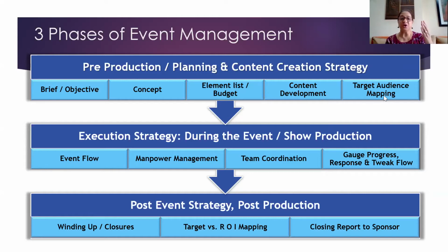Obviously, there has to be good team coordination. Like I've always said before, good event planning is each one given their responsibilities, doing their jobs well to the T, and keeping interacting with each other. We have weekly meetings. As we go closer, we have 2-day meetings, every meeting after every 2 days after the end of the day, to take progress work.